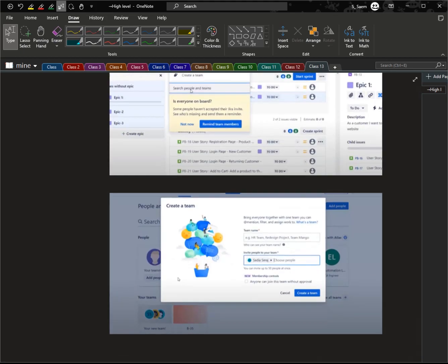Okay. In the refinement session, the Scrum Master will work with the team to assign story points to each issue. They are calculated based on the complexity of the task and how much time is expected to take. Developers, testers, and DevOps each contribute their estimate during this meeting.